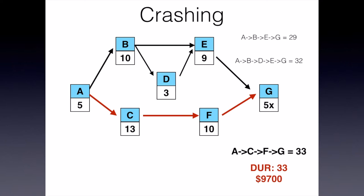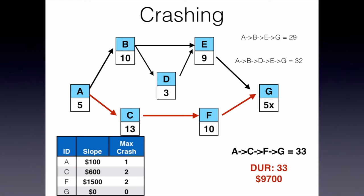Now I want to look at those tasks on this critical path — A, C, F, and G — and ask which one would be the cheapest to reduce in time. I can't look at G, but I can look at A, C, and F. It looks like A would be the one I'd want to crash here. So if I take that from 5 days down to 4 days, it will add $100 to my overall project cost. So now I know that at a duration of 32 days, it's going to cost $9,800 to get this project completed. At each step along the way though, I need to ask: has my critical path changed?